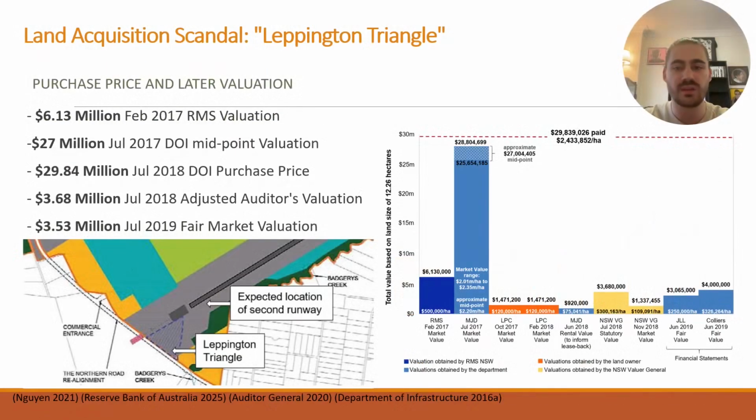Price only 11 months later. The report identified that there was insufficient due diligence during its valuation, where the importance of land was overstated, and the risk of not purchasing the parcel at the time was also overstated and not properly assessed. The audit also found that the initial valuation was conducted by a valuer recommended by the landowner, where it was incorrectly assumed that there was no conflict of interest, as well as the purchase price and existing market valuations of the parcels being omitted while presenting the acquisition to the decision makers.